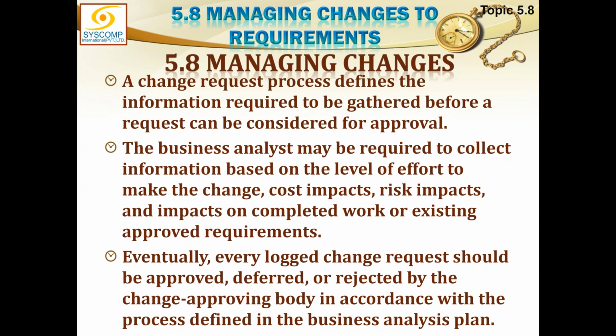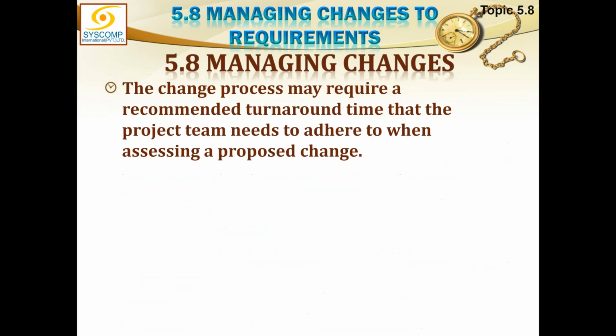The business analyst may be required to collect information based on the level of effort to make the change, cost impacts, risk impacts, and impacts on completed work or existing approved requirements. Eventually, every logged change request should be approved, deferred, or rejected by the change approving body in accordance with the process defined in the business analysis plan. The change process may require a recommended turnaround time that the project team needs to adhere to when assessing a proposed change.